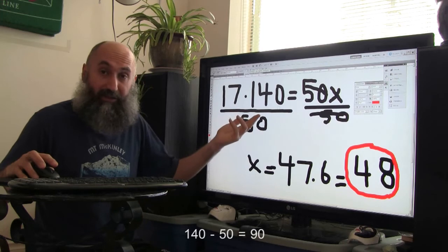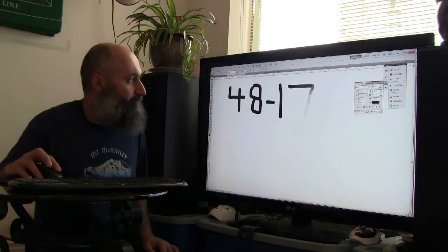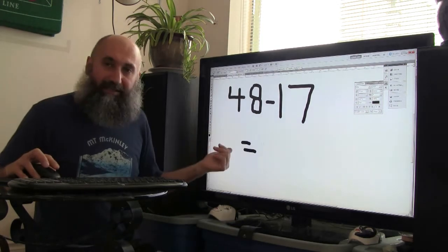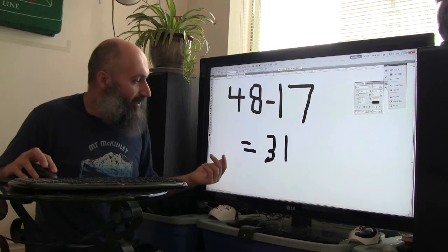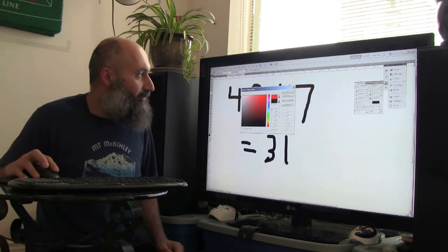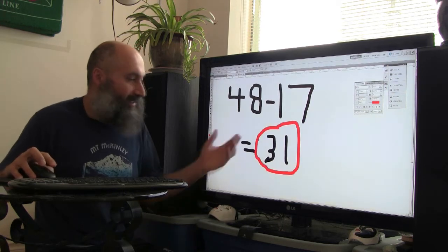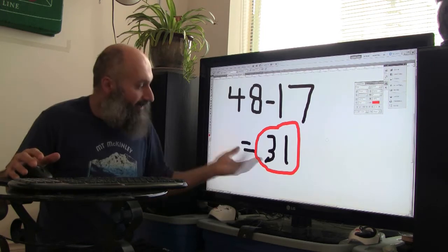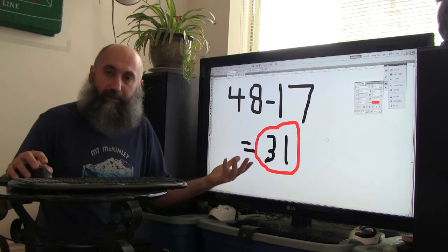Which is 90 more videos to do. So let's create another thing here. 48 minus 17, and that's going to be 31. So I have another month, 31 days of video editing to do, and that's, again, ahead of my schedule. I'm doing this in less than 2 months, so I'm happy with this. I'm happy with the pace that I'm going with the project, and I've gotten a fair bit done so far.